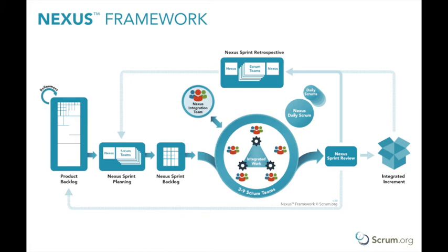Individual Scrum teams may choose to apply a more stringent definition of done within their own teams, but cannot apply less rigorous criteria than agreed for the increment.